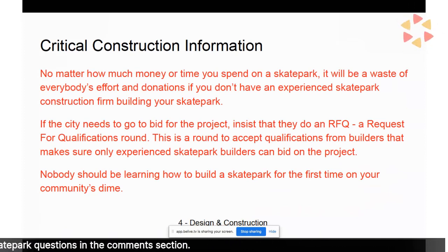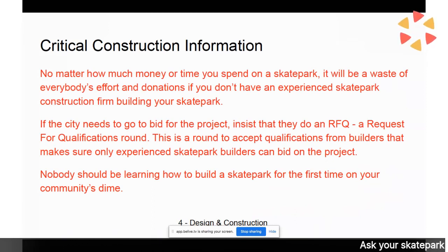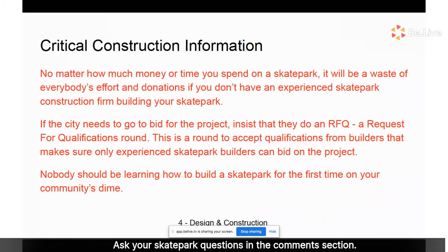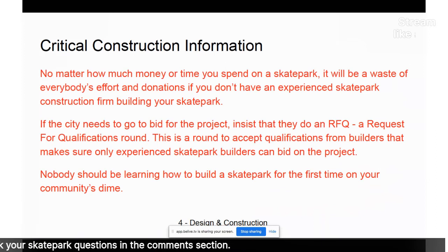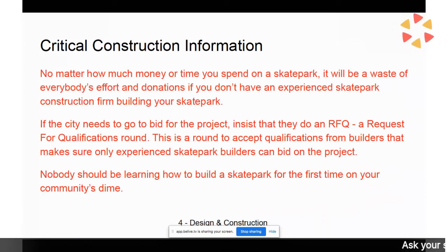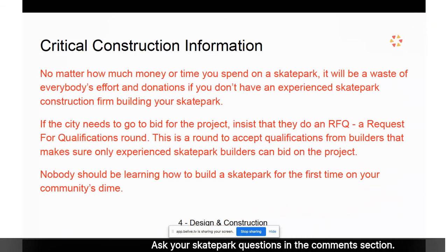So you need a bid for a project, meaning go out and say, I need the lowest bidder list. And it's a good process. Cities have that, so nobody can say, hey, I'm the mayor and my brother has a construction company and he's going to do a great job, so we're going to choose him. It keeps corruption out of the equation.